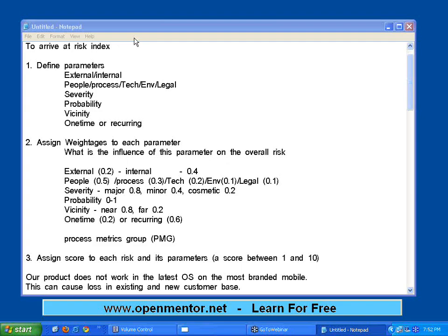One of the risks that we faced: one of our employees used to have thyroid problems and some other BP related issues. So if I load that person more, he will have health issues, right? Accidentally, if we load him without realizing it, next day he's off. It is not his problem, his intention. His health doesn't allow it. It doesn't happen intentionally, but unintentionally if something happens. So it's a risk to the project, but how can you avoid the risk? You need to plan better. So for a risk manager, the planning and the monitoring is the key.